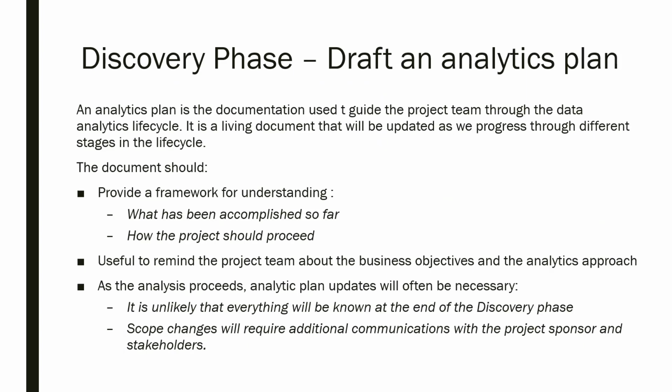Okay. You need to draft an analytics plan, and this document should provide a framework of understanding what has been accomplished so far and how the project should proceed. It's useful to remind the project team about the business objectives and the analytics approach, and as the analytics proceeds, the analytics plan will be updated as often as necessary. It is unlikely that everything will be known at the end of the discovery phase, so keeping it a dynamic document is really important, and the scope also changes, and that will require additional communications with the project sponsors and stakeholders.